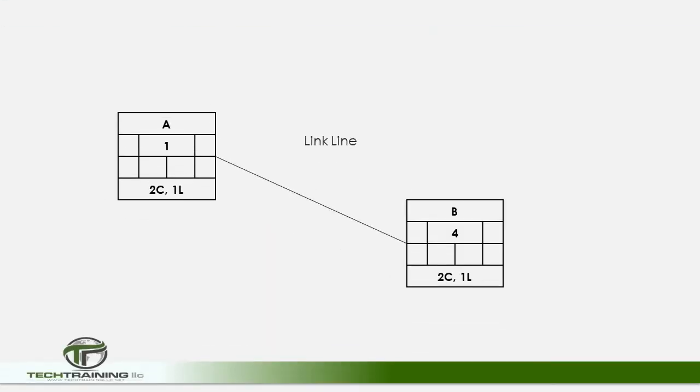The lines in the diagram are not meaningless. They represent the links between activities. These lines represent the interdependency of one activity upon another. Links are also viewed left to right to indicate the relationship, meaning the left side of the line is the beginning of the link line, and the right side is the end of the line connecting the two activities.